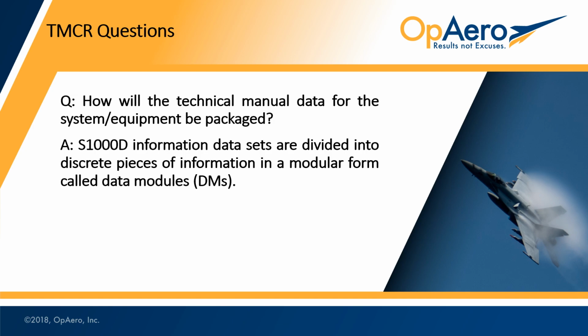So how am I going to deliver that? In S1000D products, we have what's called a data module requirement list. That's pretty much an inventory of everything that's in the pub, in the IETM. So you would deliver that DMRL and then be specific on, okay, we want all the deliverables, whether they're in their raw format or in more developed formats. So you would have DMCs packaged up in the common source database and then deliver that, whether it's a zip file or however you specifically would like it delivered. I've seen it many, many different ways. Okay, but be specific in the TMCR.